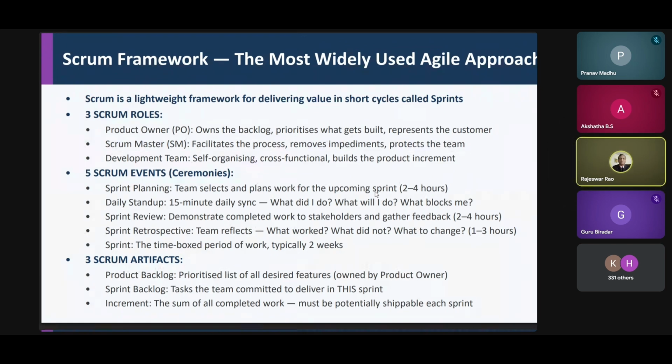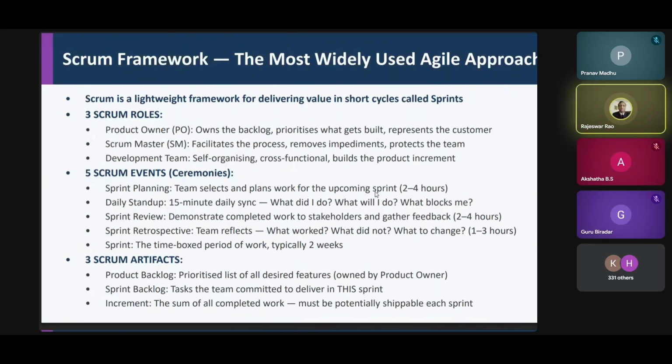And finally, you need to have documentation of the completeness of the work, which is also called an increment. And that has to go along with the product being released to the client, saying that this entire project is divided into 10 or 12 modules. This is module number X, which I'm delivering. These are the features being delivered now. This is delivered cumulatively. This is what is left. And it has to follow a certain plan, a certain timeline, a certain percentage of completeness. And that document has to go along with every sprint release which goes to the client.